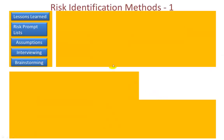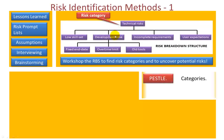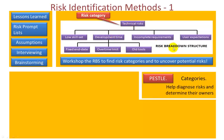Risk identification methods include: lessons learned — taking risks from similar projects; risk prompt lists which may be in-house; assumptions, since any assumption is potentially a risk; interviewing key staff with relevant experience; and brainstorming. A very good technique is to consider using a risk breakdown structure. Here I've used technical risks as one of many categories — you could develop a breakdown structure for a particular project to identify areas where risks may occur, then enter them into the risk register and determine appropriate responses.